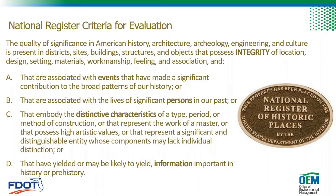Only one of these criteria needs to apply for a resource to be considered significant, but it also has to possess integrity — meaning it's still able to convey the characteristics that make it significant. For example, if we're discussing a significant structure but it's so deteriorated that it's in ruins, it doesn't possess integrity and would not retain its historic significance. If, after a field survey and evaluation, there are no historic properties in our APE and DHR concurs, we're done at Step 2. If we do have historic properties in our APE, we have to assess the project's effects on them, bringing us to Step 3.